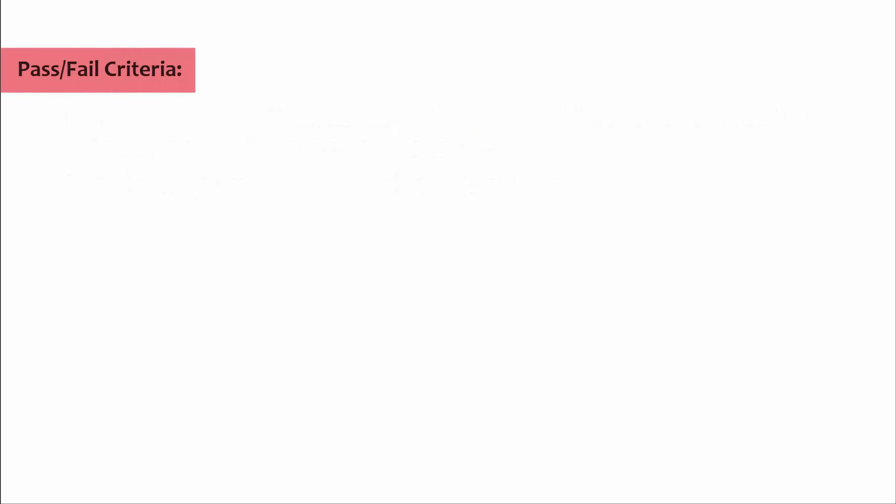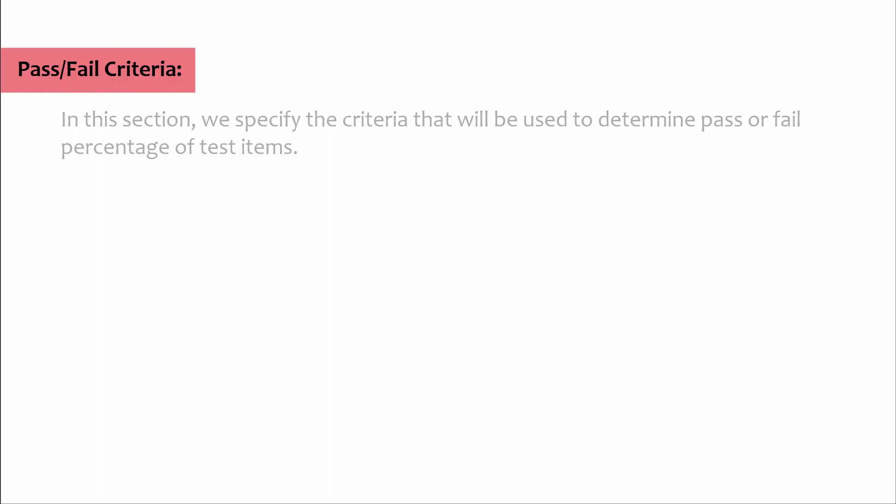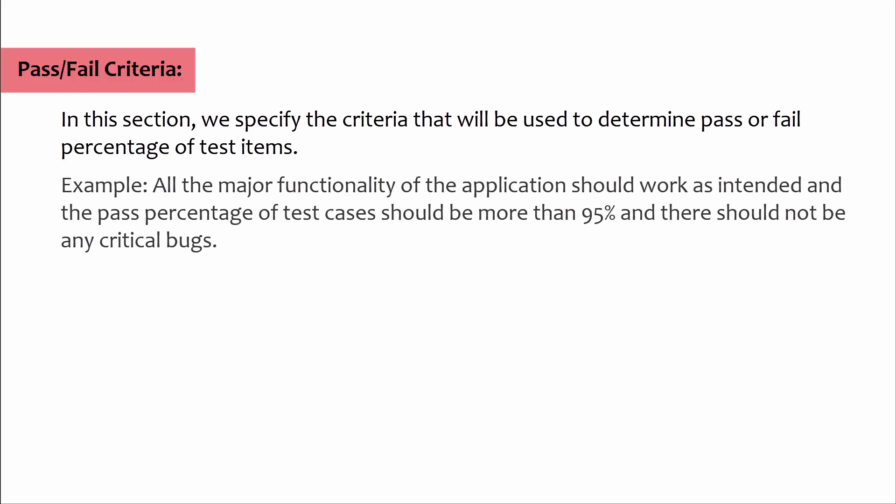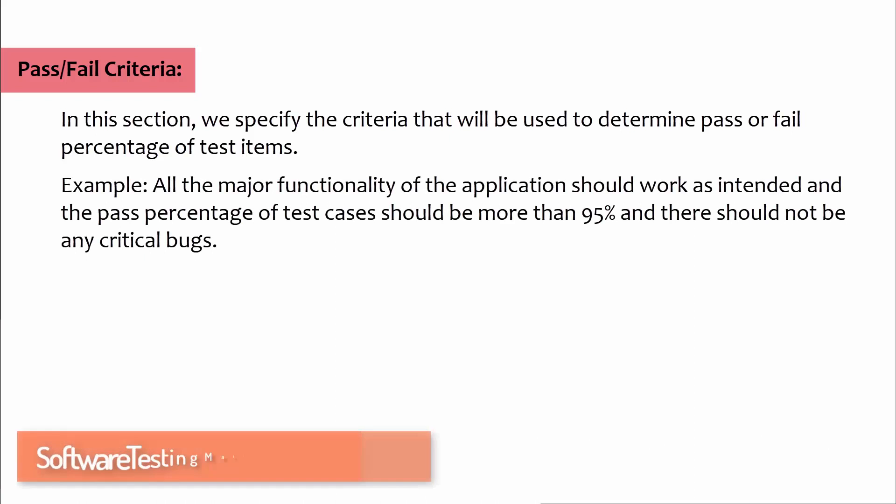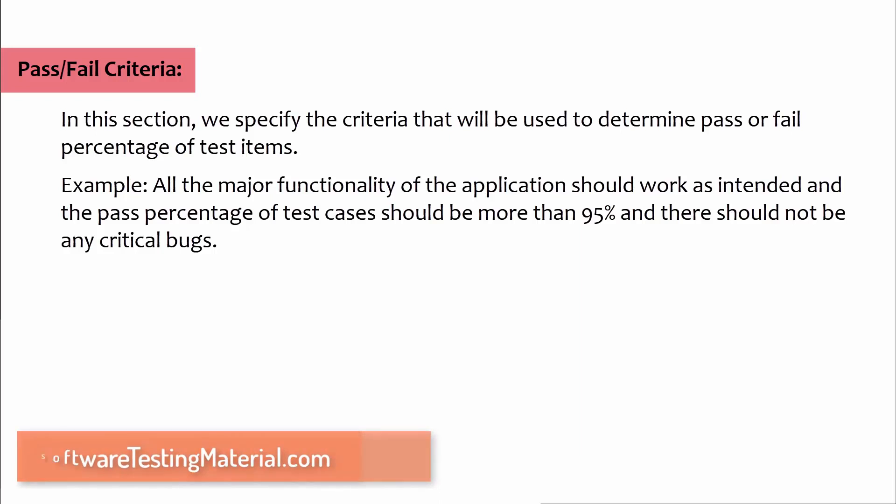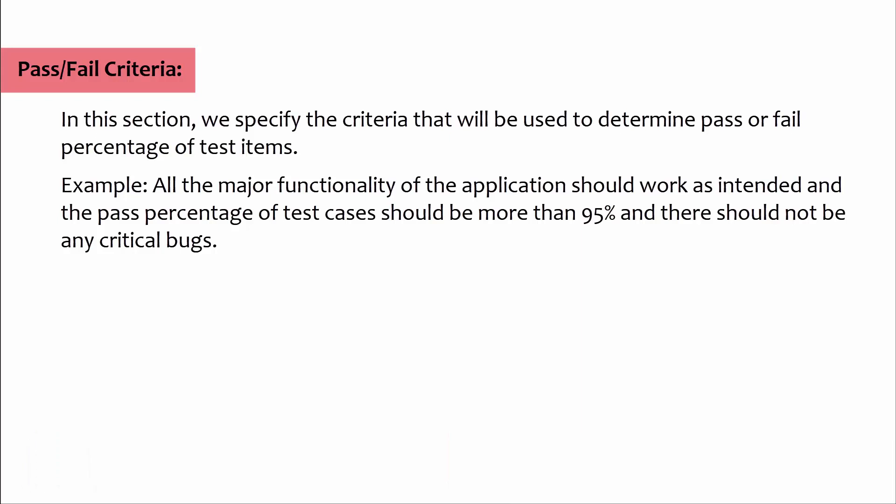Pass or fail criteria: In this section we specify the criteria that will be used to determine pass or fail percentage of test items. Example: all the major functionality of the application should work as intended and the pass percentage of test cases should be more than 95 percent and there should not be any critical bugs.